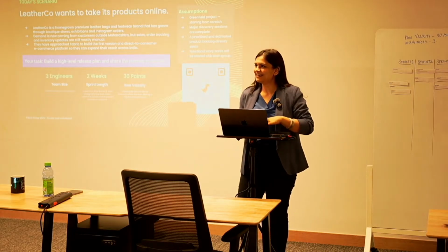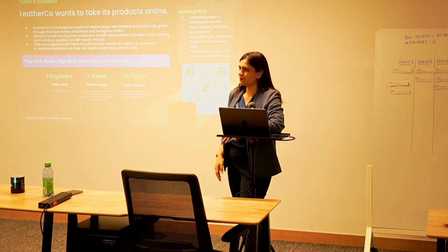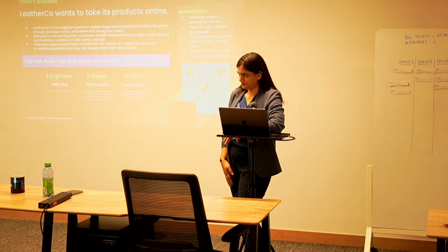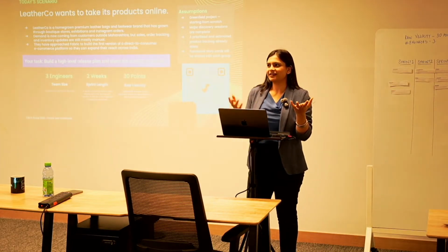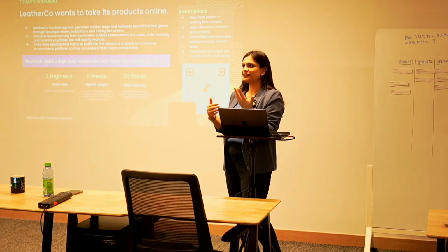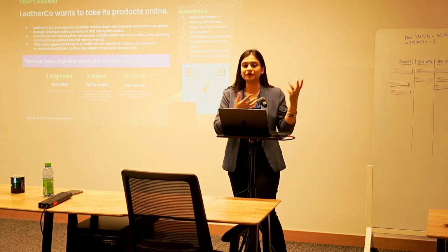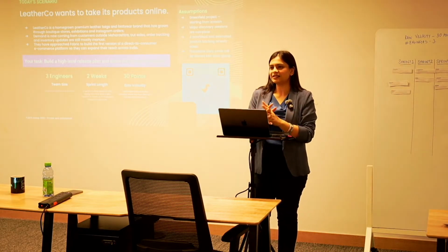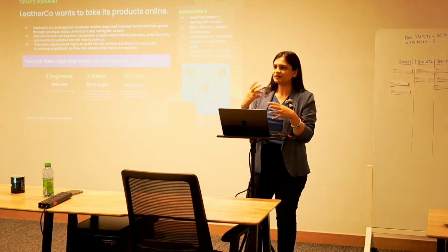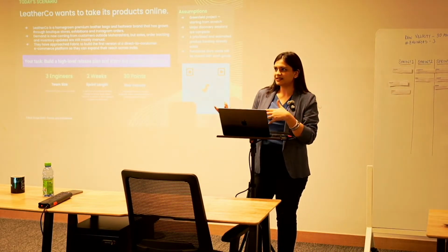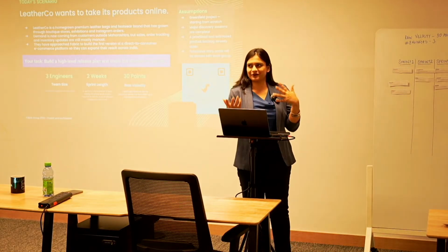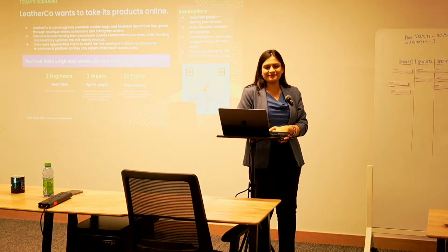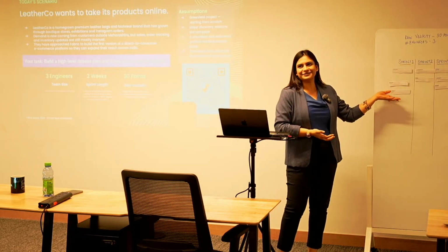Generally we do sprint 0, where people are building up that base. So sprint 1 can be thought of as that. No, like we mentioned in the assumptions, it's a greenfield project. We are starting from scratch. We didn't really have a concept of sprint 0 here at least. But yes, that's something that we do follow, where we usually focus on spikes, on setting things up, getting the right kind of accesses and also onboarding people. But in this case, we did not consider that. So ramp up is one thing that nobody really questioned.